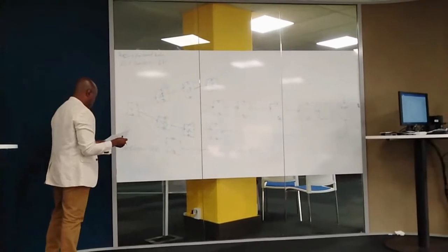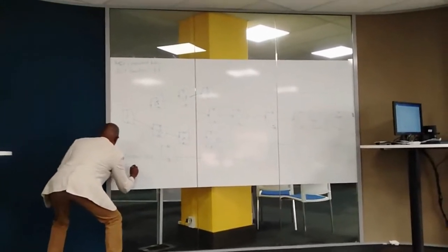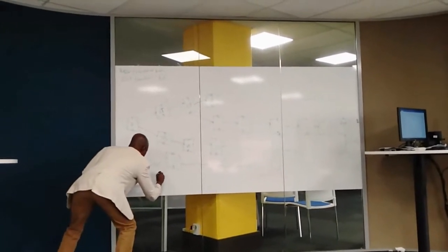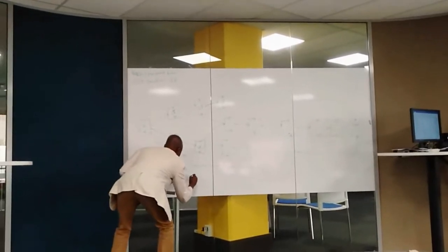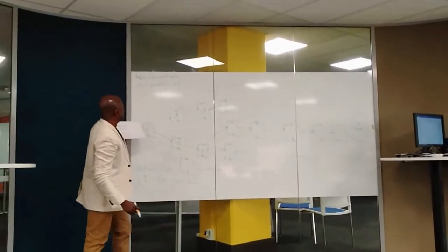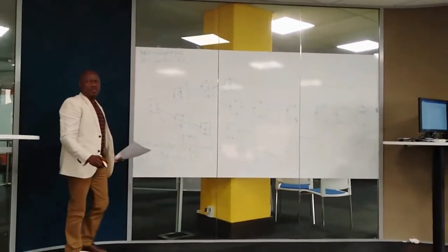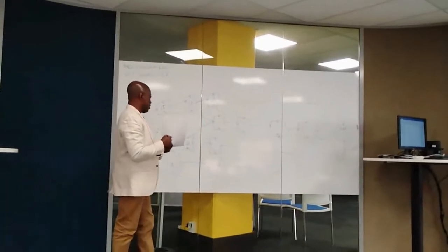So this is going to be late finish minus duration equals late start. Moving from the end back is going to be late start. That formula must be there for us to calculate.